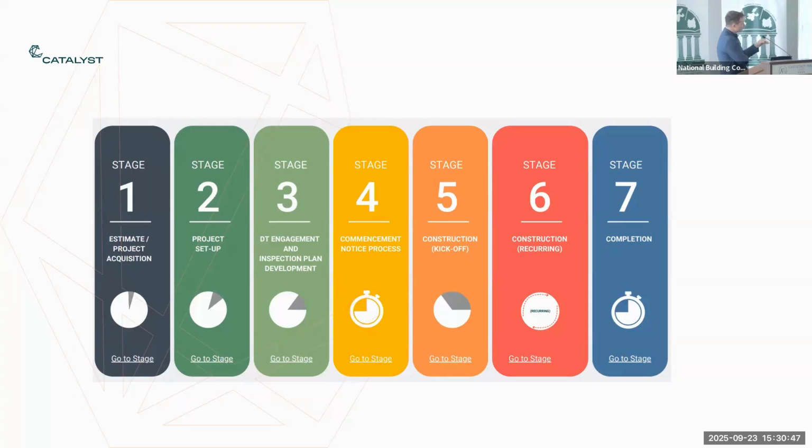At this stage as well, we as a company, and I presume other people have different methods of capturing this information, send out a BCMS questionnaire to the design certifier to collate. This is effectively all the bits of information that are required to be inputted into the BCMS. So we need that as early as possible so that we can draft the BCMS application.